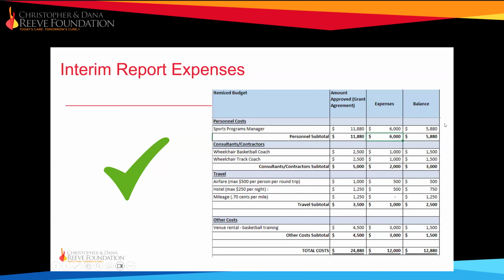Well, what does that mean? It means that if your approved budget is $11,880, but the actual expenses, as it turned out, are going to be 14,000, let's say, and you're using internal funds to cover the difference between the 11,880 funded and the 14,000 actual, because you use internal funds and we don't manage anything but what we funded, you don't need to include that expense into this file. Just limit the maximum to the amount funded.